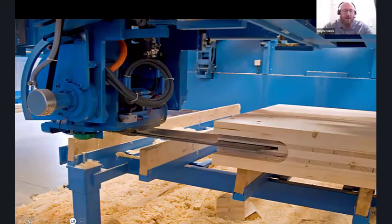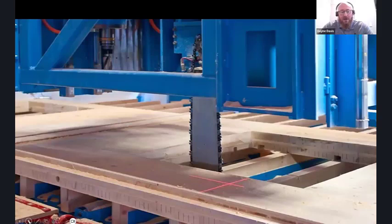We had to think about fire. We had to think about constructability, because we had one chance to get it right. If it comes on site and a panel doesn't fit, we can't just order one and it's there in a couple hours. We're talking weeks and months. So it's so important to have the right people around the table to determine all of these things early.